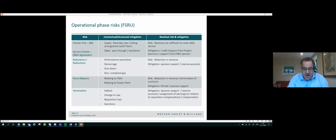Now, at this point, it is probably worth mentioning there is likely to be a detailed regime setting out which party is responsible for obtaining the relevant authorizations, permits, licenses, etc., and the consequences for the relevant party of its failure to obtain such authorizations. Broadly speaking, the FSRU sponsor will be responsible for obtaining all authorizations required for the importation of the FSRU into the relevant jurisdiction and for its operation at site during the charter period. And the project will be responsible for all authorizations relating to the facilities at the site, the importation of the LNG, and of course, all requirements relating to the construction and operation of the power plant.